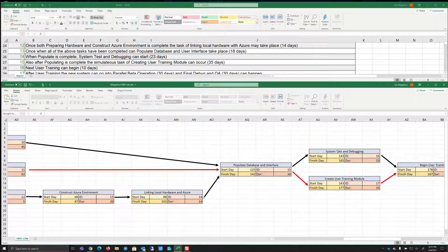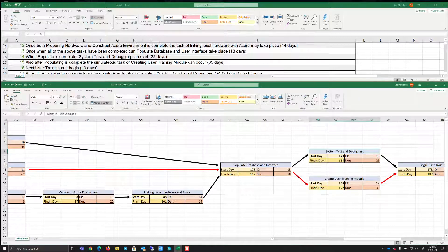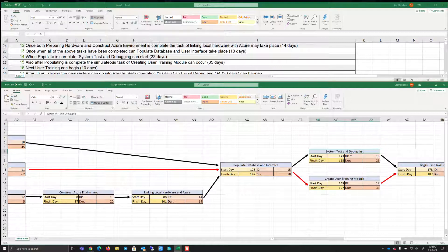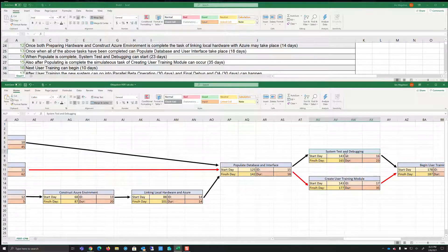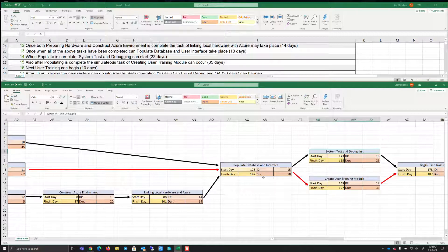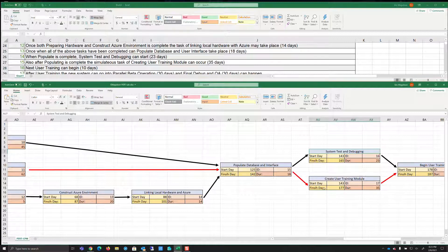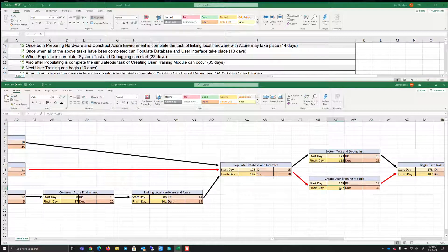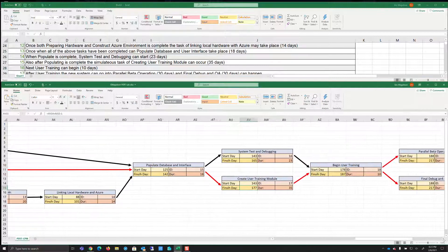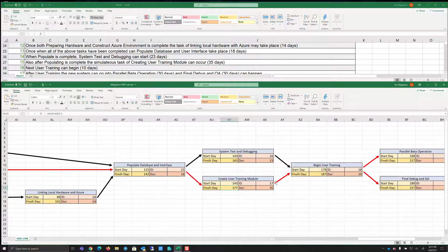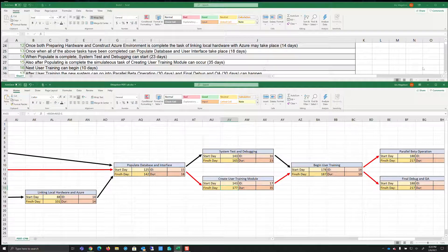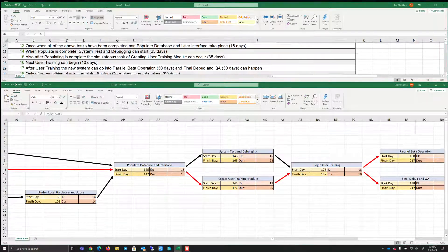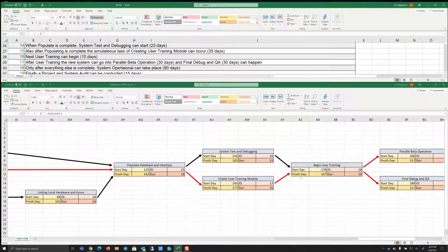After populating is complete simultaneously task of create user training module. So we can do these two. Now here's the interesting thing. We're back sort of on track, if you will, in that this one is going to take 23 days. This one's going to take 35. So again, our longest path is going to be 177. So there's that critical path up into after that, right? Next user training can begin 10 days. Next tells us, well, guess what? We can't do any of this until then. So we wait the 177 on 178. We start 10 days of training.